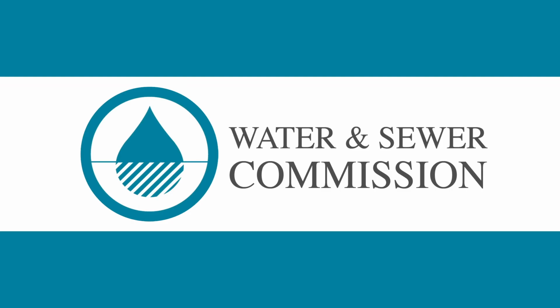They still have to make the connection of the water service. They have to run the water service across 123 and tap into the 16-inch main. I believe it's 16-inch on Main Street. So that is still scheduled. It was scheduled for today, but they delayed it probably until next week at this point.